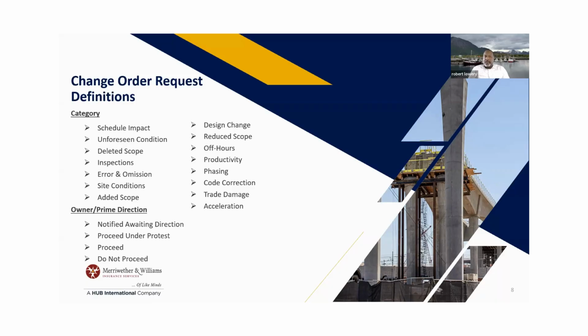So you want to be able to sit and talk to them about, hey, okay, you want to accelerate, but let's see how we can do this, because maybe it's impossible to do it 20 days less. You can say, hey, I can do it in 15, but you're still going to have to track that, and that's the reason for the change order, because it's a cost that you have to cover with your team. Or if it's a material you were expecting to come in at a certain date and now you have to say I need it earlier, they might say, okay, hey, that might cost you a little bit more for me to accelerate my production in the factory. So those are quite a few that you can select from.